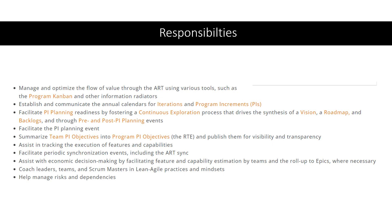First and foremost, the Release Train Engineer manages and optimizes the flow of value through the ART using tools such as Program Kanban and other information radiators. Second, they establish and communicate the annual calendars for iterations and program increments. They also facilitate PI planning readiness by fostering a continuous exploration process that drives the synthesis of vision, roadmap, and backlogs, and through pre and post PI planning events.